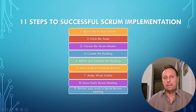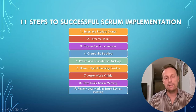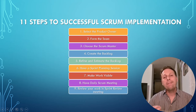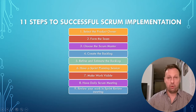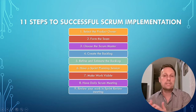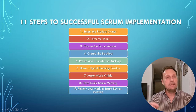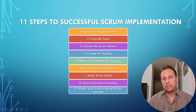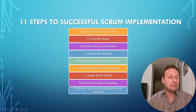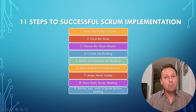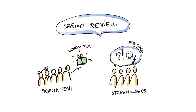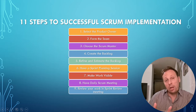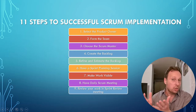Step nine: the sprint review, also called the sprint demo or demonstration. This is a meeting where the team shows what they achieved during the sprint. Everyone can attend — not just the product owner, Scrum Master, and team, but also stakeholders, management, clients, anyone. The team demonstrates only what meets the definition of done: what is entirely finished and can be delivered without any further work. It may not be a finished product, but it should be a finished unit.